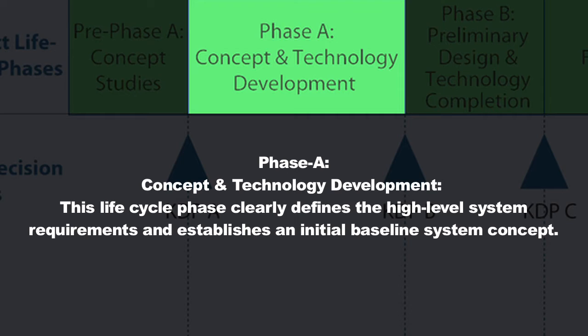We'll talk a lot more about requirements in other units, but what you're trying to do here is take these objectives and break them down into lower and lower levels of detail so that in the end you could provide specific information for the person who's going to go off and buy the propulsion tank or the battery for the spacecraft.